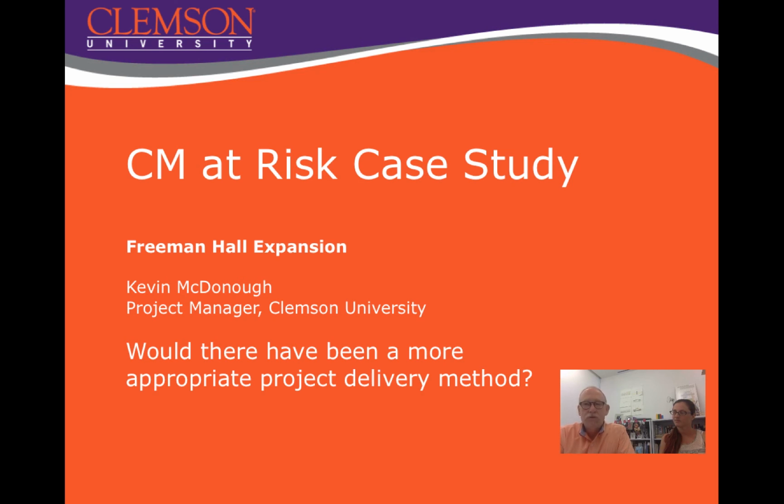It also allowed us to, instead of having to bid the job all at once and wait until we get bids in and see if we have a low bidder and such, develop our GMP, our guaranteed maximum price, and we allowed the contractor to release early packages. Even before we were completed with our design, we released our site package so that they could get a jump on all the site work that had to be done, utilities and the foundations and footings. We released our steel package early for pricing and fabrication.